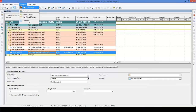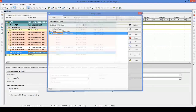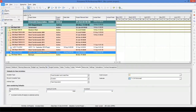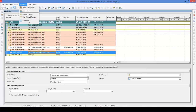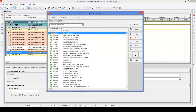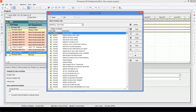Let's go to the Enterprise menu and select Activity Codes. We don't see any new work orders yet, so we just need to go to the File menu and select Refresh. Now if we go to the Enterprise menu and select Activity Codes, we can see the new work orders. Now that the new values are in P6, we can use them on our projects and assign them to activities. In the future, if we need to upload new work orders, we could extract the existing dictionary, add the new values, and upload back to P6.